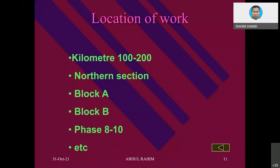Location of work: if we are building a highway, road, drainage, culvert, or sewerage pipeline, we can have chainage markings and divide according to each chainage. Different contractors may handle a certain portion of the chainage.